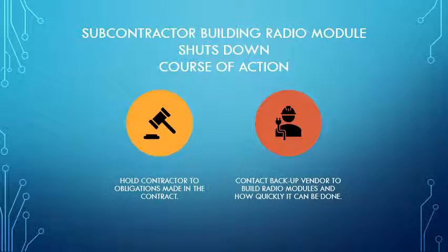SuperPACs had another unfortunate unplanned event occur when the subcontractor that was building the radio modules suddenly shut down. Quick decisions needed to be made to ensure this did not cause the project to crash. Fortunately, our contract with this vendor held them financially accountable for any additional costs incurred, but a lawyer was needed to go after them, and we are still awaiting a verdict from the courts.